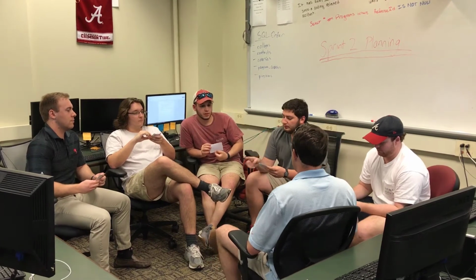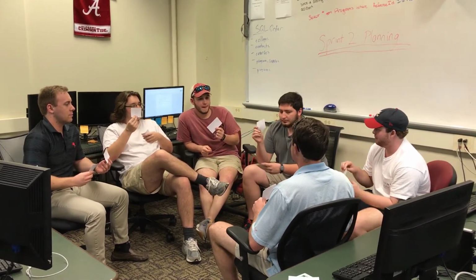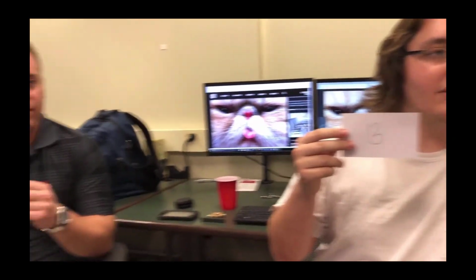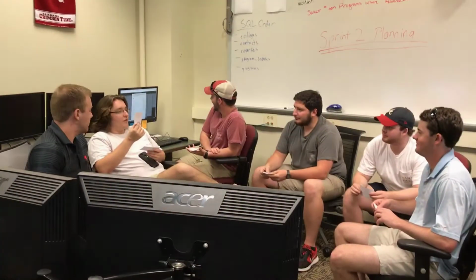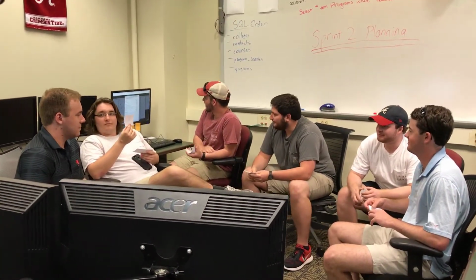Before we begin each sprint, we meet as a team for a planning poker session where we will determine an estimation on how difficult each story on our product backlog would be to complete. During this session, each story is read aloud to the team, who will then estimate how many story points or days of work that a single story will take to complete. Once each team member has given their estimate, we will discuss any discrepancies across the team. Once we come to an agreement on the number of story points that we believe the user story will take to complete, that user story is ready to be included in a sprint.